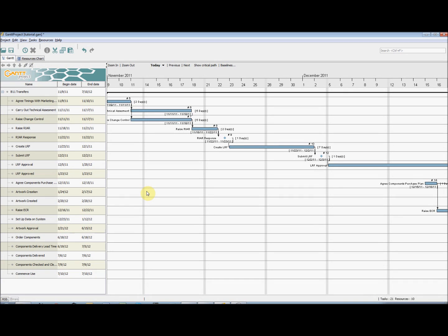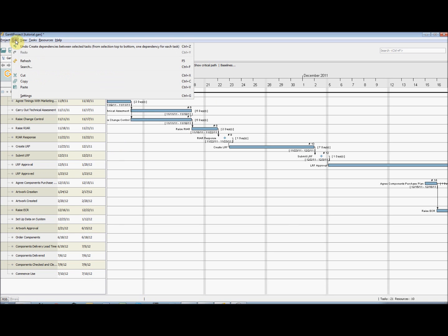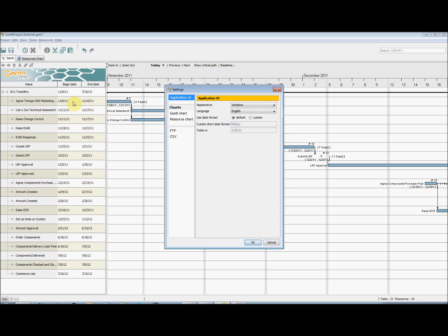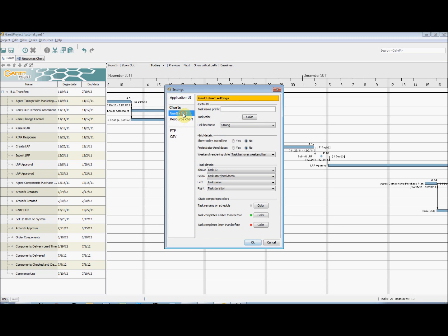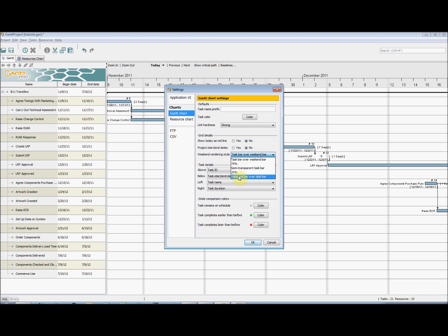We can change the appearance of the calendar pane of both the Gantt and Resources chart tabs. This can be done by going to Edit and Settings, then selecting either Gantt chart or Resource chart. If we click on Gantt chart, we can change the settings for the calendar pane of the Gantt tab. We can add in a red line to show today. We can add in lines to show the start and end of the project, as well as changing how tasks appear over weekends.